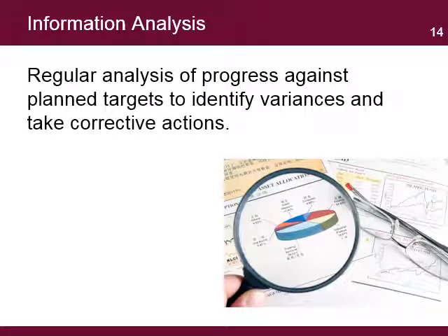The analysis does not necessarily require the use of complicated information analysis software. It means looking at the information and making comparisons to the questions that you need to answer. For example, if the project manager needs to know if the project is on track, he will look at the project targets and compare them to the actual program performance. The analysis should also be done on a regular basis. This will allow for more opportunities to identify variances and take corrective actions on time.